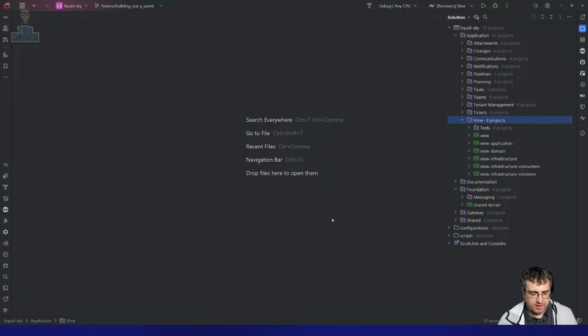If your development team develops in a certain way, your QA can't really start anything until after the work's done. So you might have a 2-week sprint, but your QA doesn't start until the back half, or you have to limit the amount of work you can do in that 2-week sprint. I've always thought it'd be okay for QA to have offset sprints.